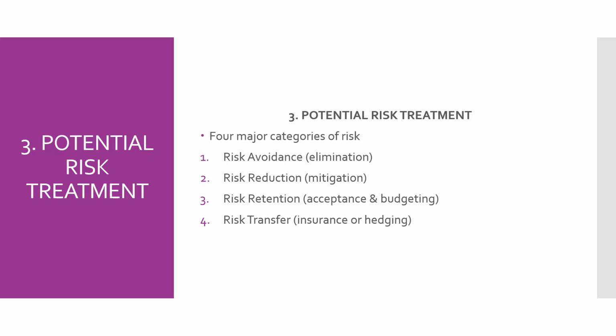Active retention is handling the unavoidable or unavoided risk internally, because insurance cannot be purchased for the risk as it costs too much, or because handling it internally is much more cost effective. Because of that, insurance is not taken for that particular risk.